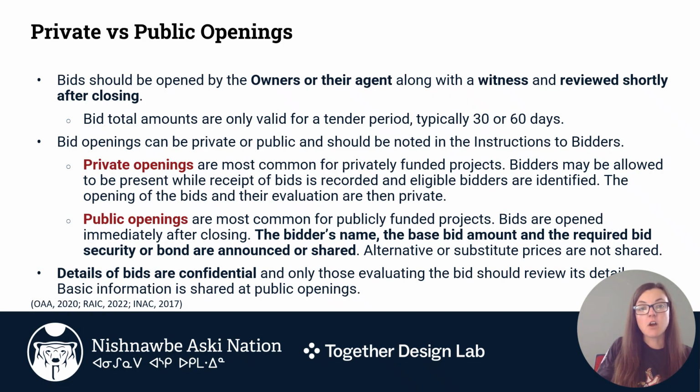Private openings are most common for privately funded projects. Bidders may be allowed to be present while receipt of bids is recorded and eligible bidders are identified. The opening of the bids and their evaluation are then private.